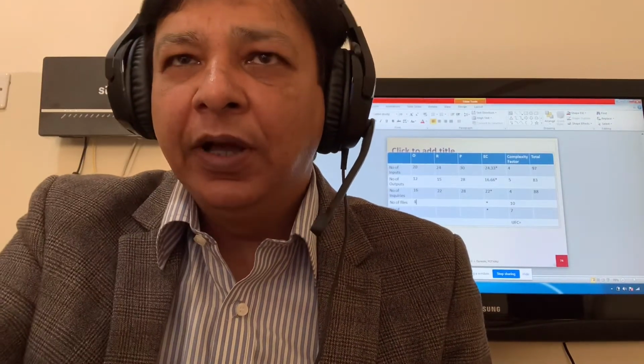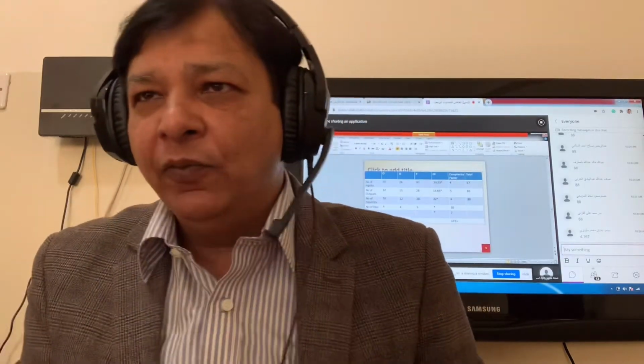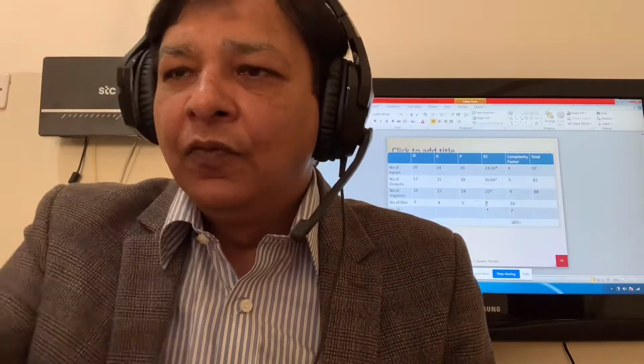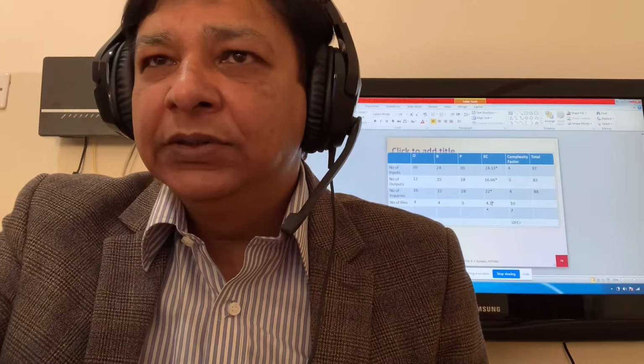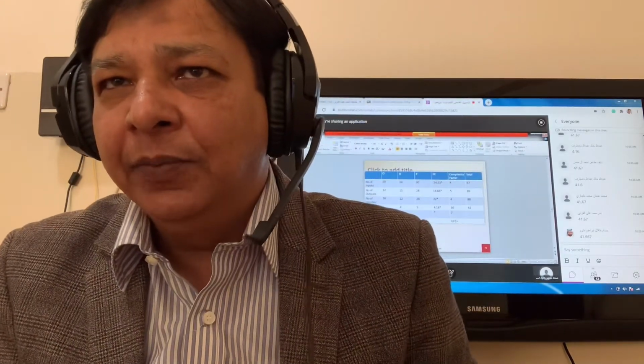4, 4, 5 for files, logical files. So what is the EC? 4.167. Very good. 4.16 multiplied by 10, so 42, because it is greater than 0.5, we can put 42.